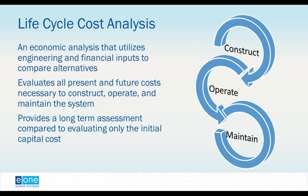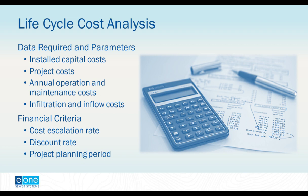When we look at a sewer system evaluation, it can be very important when considering long-term centralized sewer needs to include a lifecycle cost analysis. A lifecycle cost analysis is an economic analysis that utilizes both engineering and financial inputs to compare alternatives. It's important to look at both the near-term and long-term costs to make sure you're giving stakeholders the best bang for their buck. It evaluates both the present costs of the initial capital construction as well as the future costs necessary to operate and maintain the system.